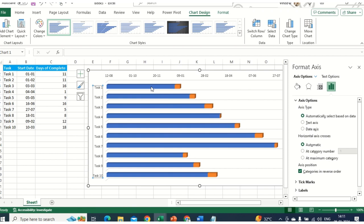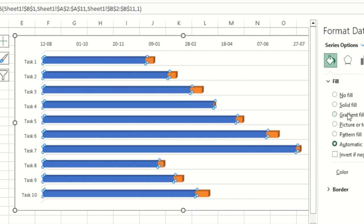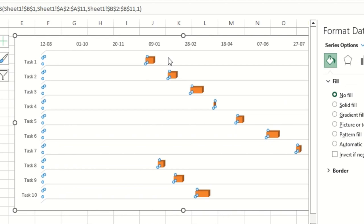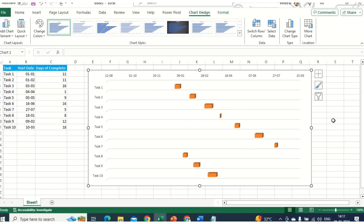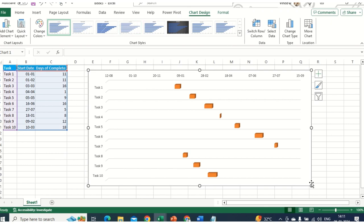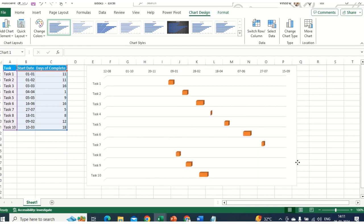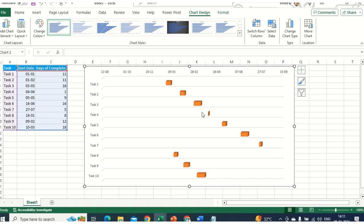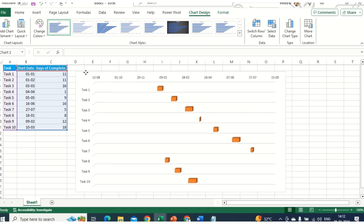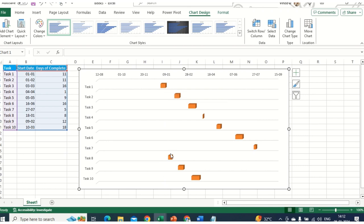Now click on the blue bar in the chart, go to Fill, and select No Fill. You'll see a beautiful Gantt chart — the blue portion is now invisible and the orange/colored bars represent the task durations. You can stretch the chart based on your requirement to see the plotted data across the dates.